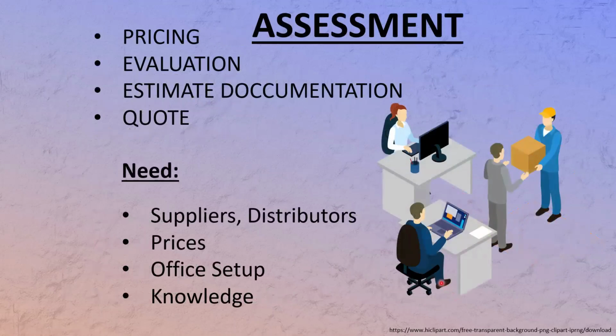Then assessment. Basically, it's preparing a quote. You need all the survey notes, and you need all your knowledge on how things are supposed to be installed and what works with what, what equipment you need, all that. And then you make a list. And you call the distributors to make sure the equipment is still available, or maybe they have something else to work with that. So that could be a somewhat lengthy process in order to gather all the prices.